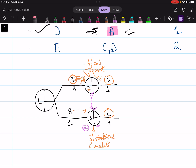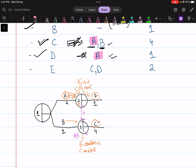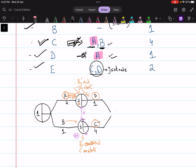Since a dummy activity does not consume any time or resources, it is always assigned a duration of zero. We are now left with activity E, which requires both C and D to be completed together. We create a joint node connecting D and C, then draw activity E with duration 2, followed by a final node indicating the project is complete.